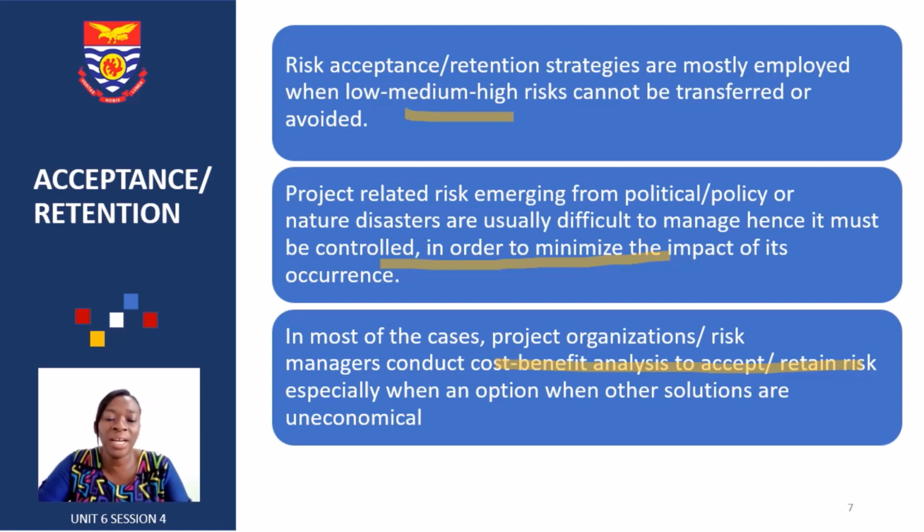Sometimes you look at this, and if you go for insurance over it, they may not even want to insure it, or the price will be too much. This is something which may not really happen, or when it happens, the impact is not going to be so hard on you. You can just take it on. When it happens, you just pay for it or solve it.